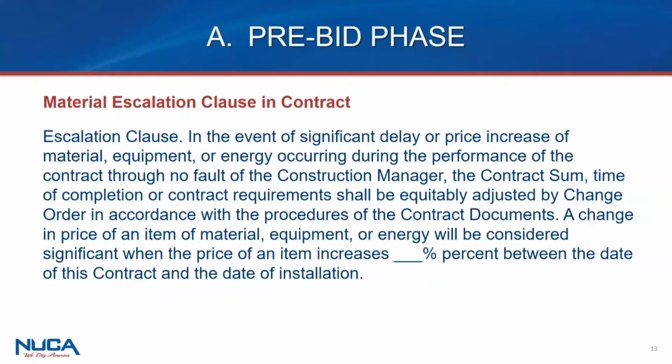Certainly you can suggest something. I think, when we're talking about federal contracts, material price increases that go over 20% of the estimated quantity are allowed to be negotiated at a different unit price.